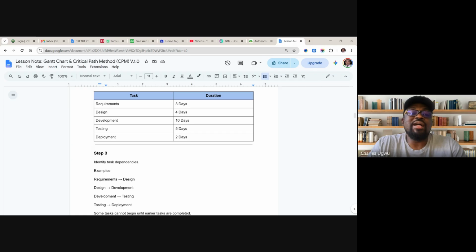And there's no way you can start testing what is not developed. It's after development, when they say yes, we've finished developing, that you carry out testing. And if you deploy without testing, that can be a very big embarrassment. You know, deploying work to the public and everybody identifying faults and bugs everywhere. So you have to carry out full testing before you deploy.